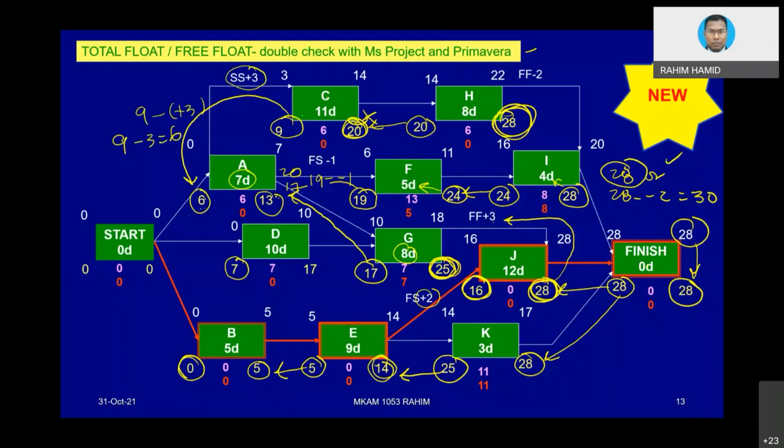So now the choice that we have is either 13 or 17, the value that we calculated before. Which one is the lower value? For sure, it is 13. How do we get 13? It's coming from C, actually. Meaning C is the dominant relationship, and it will be put there as that value.